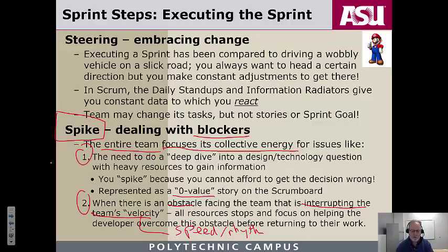Spikes are supposed to be relatively short. Normally, in teams I worked on, they're meant to be measured in terms of hours, not days even, because your whole sprint is supposed to be short. So it might be the team taking the afternoon and, working together around a bullpen, taking over a conference room, doing what they need to do to move through the blocker. Now, if the blocker goes on 4 days, then you might have to consider more drastic options.